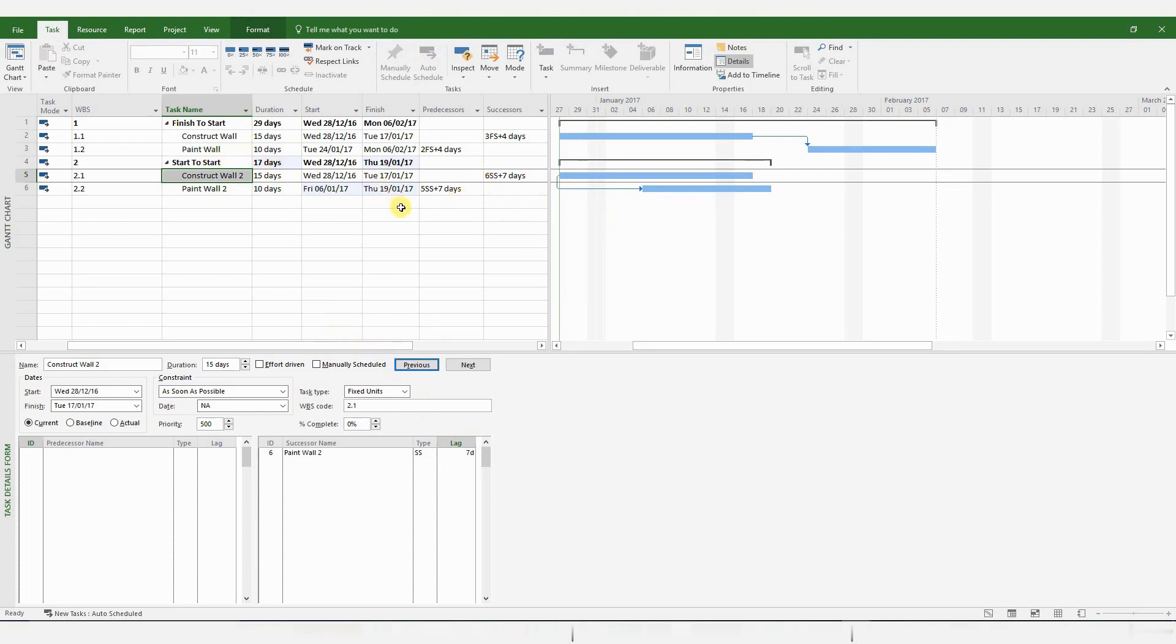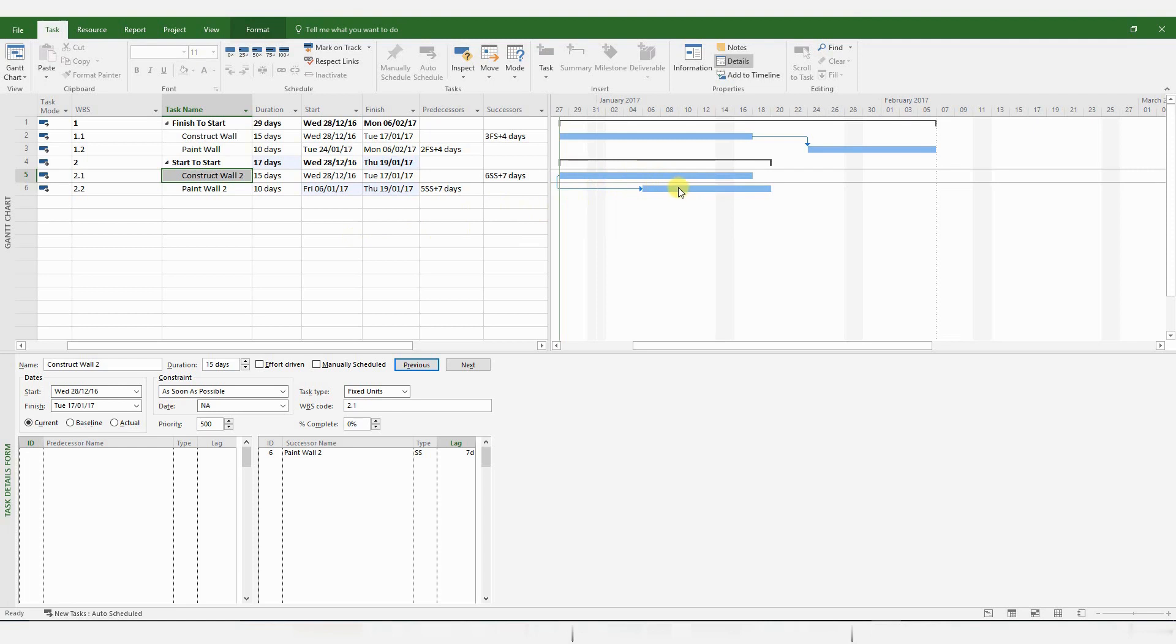And you could create a Start to Start link by adding successors, predecessors, or by dragging between the two activities, as I showed you before. But you have to remember that when you drag between two activities, or you create a dragged link between two activities, you normally get a Finish to Start relationship as default, and you will have to modify it here. So it's probably more efficient to create a link directly from the Task pane.